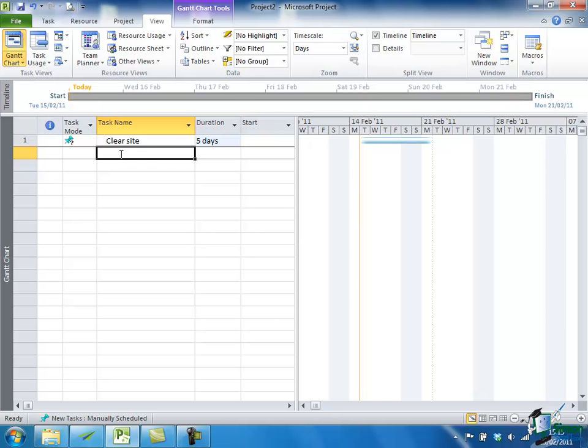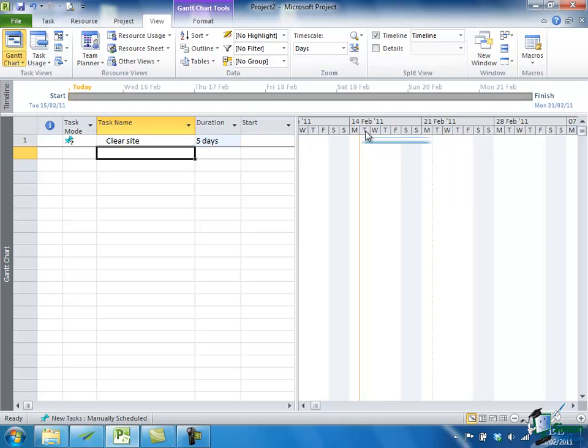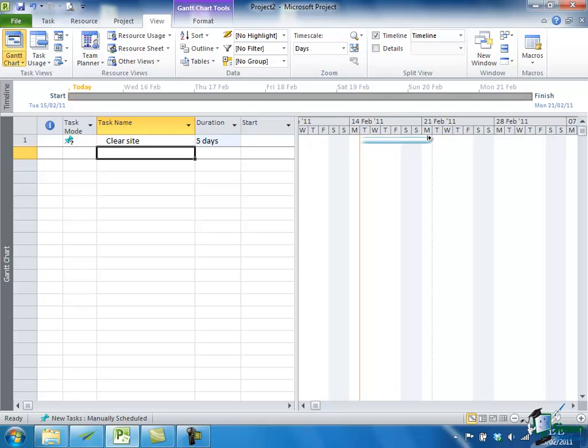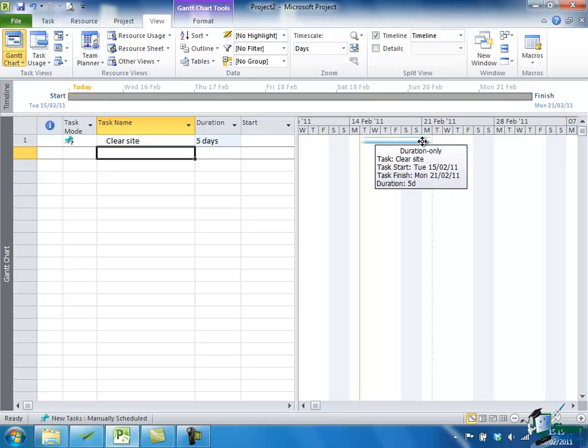Now what happens as soon as I put that in is that a bar appears on the Gantt Chart starting on today's date. It's actually Tuesday the 15th of February today, and now my task is scheduled. You'll notice that it goes from Tuesday the 15th to Monday the 21st. That's five days in working time, ignoring the weekend. Now things like dealing with weekends we'll come back to later, but for the moment it's set up to work pretty much on a standard working week.